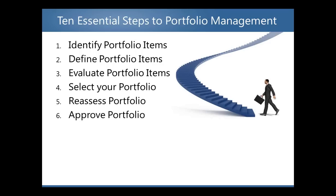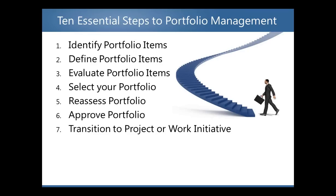Step six: approve the portfolio. Once the portfolio selection team has had time to reassess the portfolio based on further information, the approval process can begin. The approved items then go into an execution stage and are typically handed off to the project team for execution — though that may vary across organizations. Step seven: transition portfolio items to a project or work initiative. The approved items are then promoted to actual projects or work and moved to the execution phase. At this point, a project manager will typically be assigned.